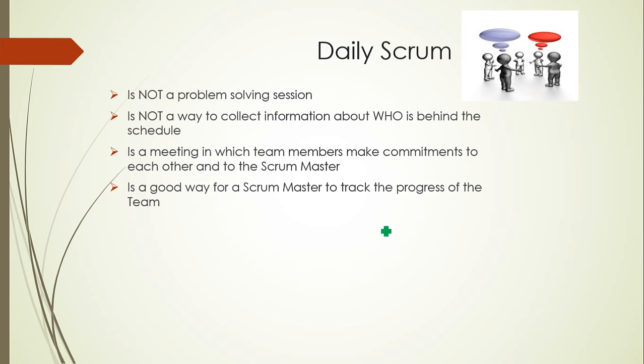Again, this meeting should not last more than 15 minutes. If there are any issues or blockers to be discussed, then a separate meeting is scheduled by the Scrum Master, that is a breakup session, and only required participants attend that meeting.